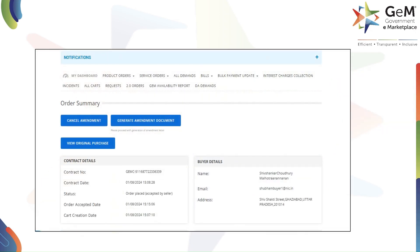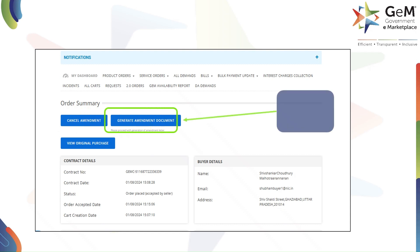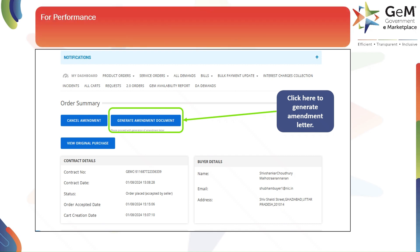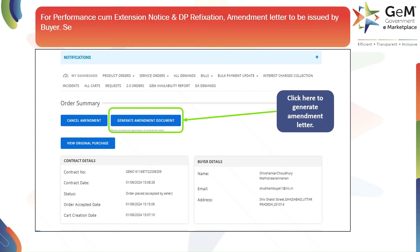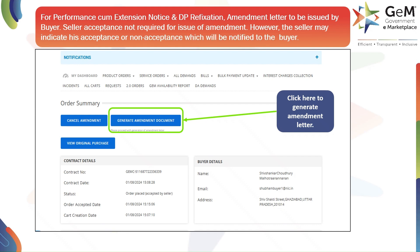To finalize the amendment, you can cancel it if you change your mind. Click on 'Generate Amendment Document' to proceed. Once generated, an amendment letter will be issued for performance cum extension notice and delivery period refixation. The buyer issues the letter and the seller doesn't need to accept it right away; however, the seller can indicate if they accept or not, and you'll be notified.